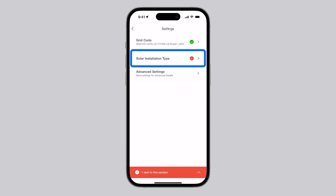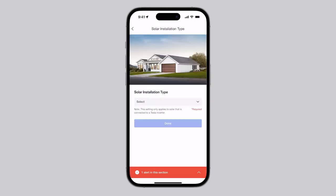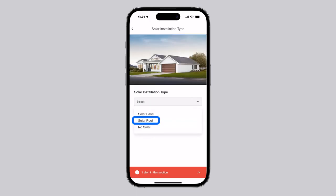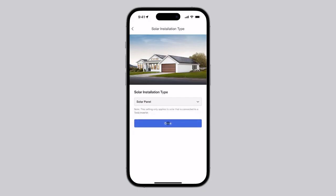Select Solar Installation Type to configure the site as having either solar panels or Tesla solar roof. This field is required for solar to function properly and for the Tesla app to display the correct visuals. Select either Solar Panel or Solar Roof and then tap Done.